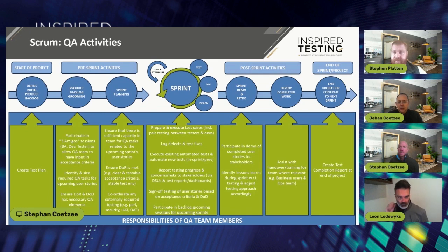And I think that 30%, if I understand your question correctly, is how do you bring that down so that we don't just assume we're going to waste 30% on rework. I think it could differ per team. The most important thing is to make notes of those things and in your retros try and get to the root cause of what caused those defects. Was it communication?